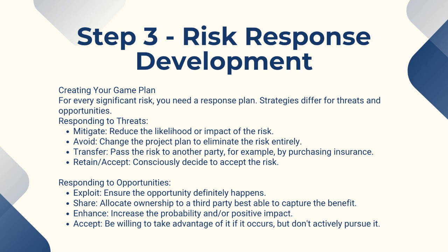For positive risks or opportunities, our strategies are exploit, taking action to ensure the opportunity happens. Share, partnering with another party who is better able to capture the opportunity for the project's benefit. Enhance, taking steps to increase the probability or positive impact of the opportunity. Accept, being ready to take advantage of the opportunity if it arises, but not actively pursuing it.